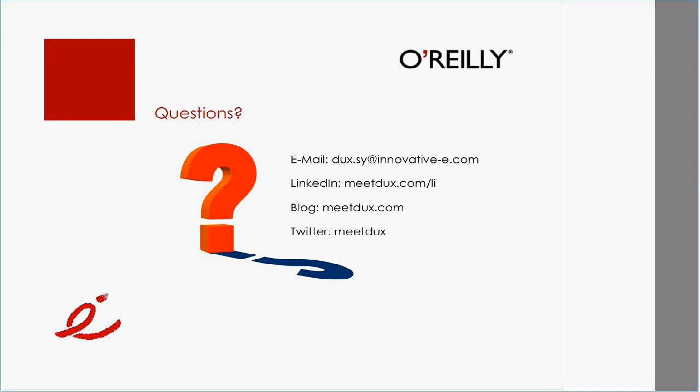And second, set up metrics of what SharePoint will do for you. For example, in 3 months, we will improve our efficiency. Users won't spend 45 minutes a day looking for stuff. Because of SharePoint, after 3 months, they'll only spend 20 minutes. So you've got to set up all these metrics and measure the success of SharePoint. Without doing that, you won't be able to be successful. So do you have to know SharePoint? Yes, but not at a very deep technical level.